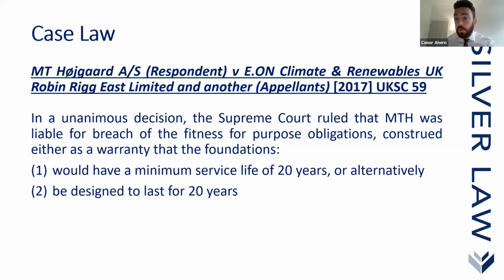The reason why we don't see it a lot is actually because, well, one of the reasons, I guess, is that you can't actually obtain insurance for fitness for purpose obligations. So if a contractor does come across what appears to be a fitness for purpose requirement, then it's got to be very careful to make sure that it's comfortable with taking on that risk.